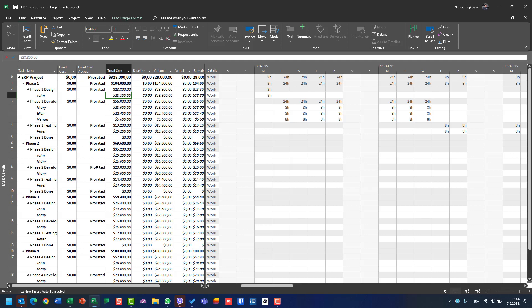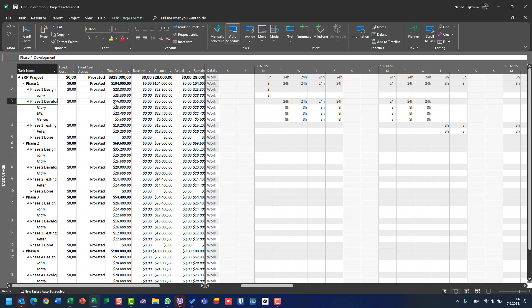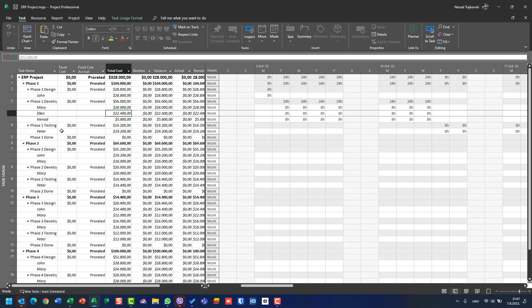To be more precise, when I go to Phase One Development, the total cost will be $56,000, built from $28,000 from Mary, $22,400 from John, and $5,000 and $6,000 for Nanette.